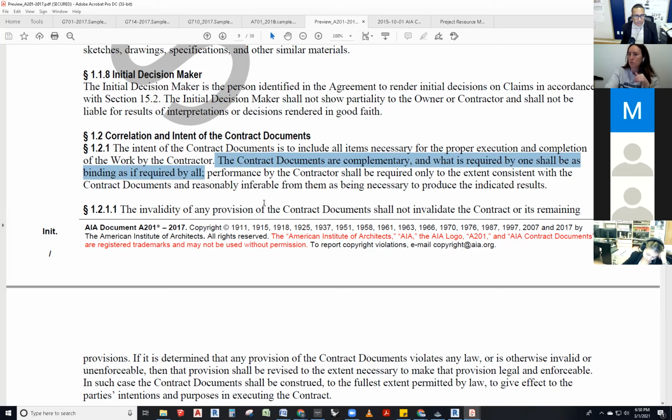We always mark up drawings and say, don't show that, don't show this. Why? Because we're looking for scope of work, scope of services. It's not relevant how cute of a layout you did for the contractor. That will be a design drawing for the owner, separate, not for the contractor. That's why we have schematic drawings, bidding drawings, construction documents, and permit sets. There are things that the building inspector doesn't care about. Sometimes for a permit set, you can just show one sheet. Here it is, go. You don't need to show the whole set, just exactly what you need to get the permit.